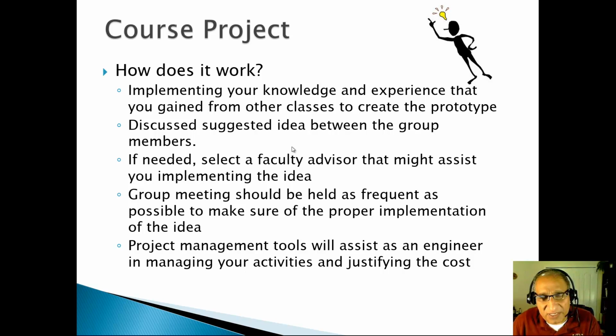We need somebody who is medium skilled or low skilled in cutting wood, and we can give them $10 an hour. So it will take about 15 minutes, that's a quarter of an hour, and they are charging $10 an hour, so that will be $2.50 to cut the wood.